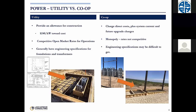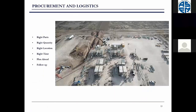Power can come from a utility or a co-op. Utilities are usually larger and more organized — they'll say here's a drawing set and a spec you've got to follow. A co-op says, we put in something similar last year, go look at what we put in and we'll just do that again. So how you get your information to design your system differs. Procurement and logistics: right parts, right time, right quantity, right location — plan ahead, follow up. Logistics is absolutely critical. There were hundreds of millions of pounds of steel in this project.